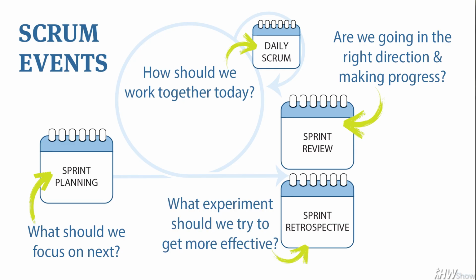Many Kanban teams benefit from something like those 4 events, but since there's no sprint, they don't have to happen on the same cadence. You might examine and refine your input queue of planned work every week. You might demo and reflect on the results every 2 weeks. You could have a retrospective once a month. It's kind of funny. We've noticed that teams who leave Scrum for Kanban because they complain that Scrum has too many meetings, but then who take continuous improvement seriously, inevitably end up with their own versions of the 4 Scrum events, just with different names.